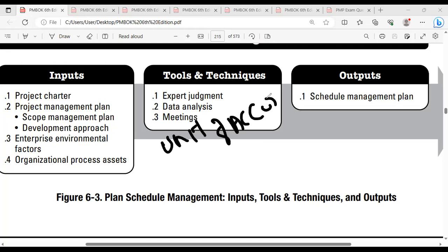Unit of accuracy. On what basis are you going to bring the unit of accuracy? There should be an accuracy in your estimation. So unit of accuracy is based on the estimation methods you have used. Different methods have different ranges, so based on the estimation method, you need to know your unit of accuracy. For that, you can develop your contingencies. Unit of accuracy lets you prepare the contingency depending upon the estimation method you used to bring those numbers. This is very common for the unit of measure and unit of accuracy, and you need to define them in the schedule management plan.